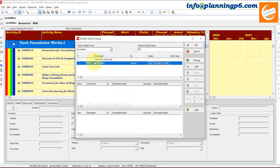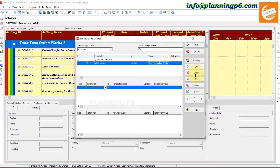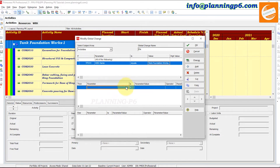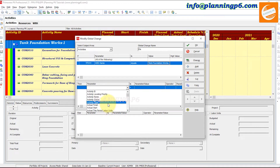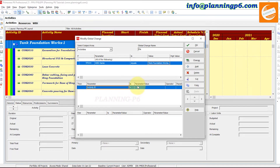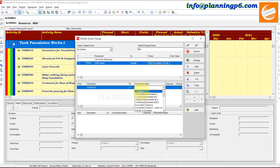After selecting the parameter, click Add. You can also delete, cut, copy, and paste as usual. In the 'Then' section, select Activity ID from the many available options such as leveling priority, activity names, activity status, activity types, actual finish, actual start, and more. Set the operator — for example, 'is equal to' — then provide the parameter value.